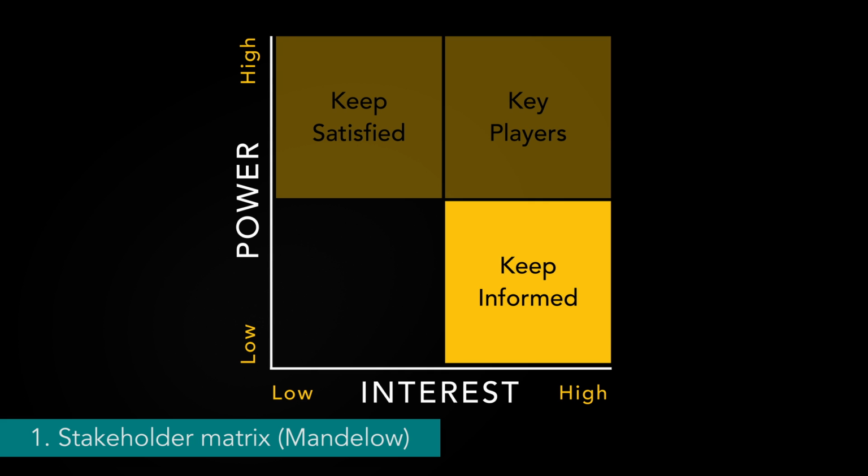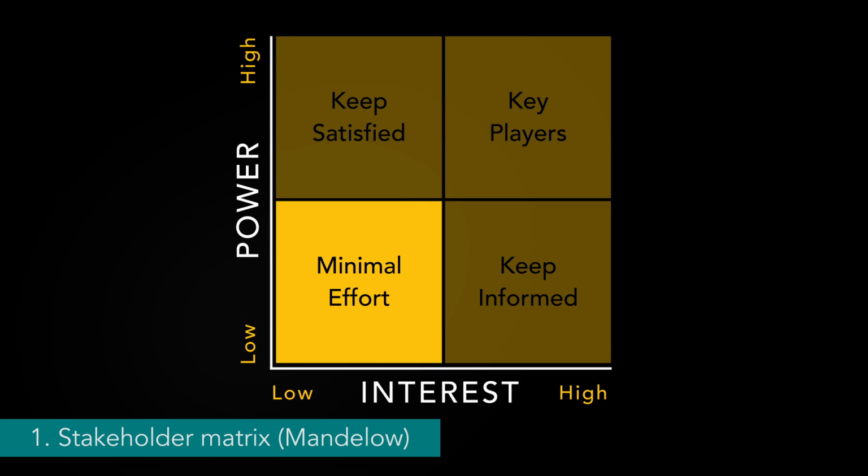Trust me, it's real. And number 4, lastly, you have your low-power, low-interest stakeholders. In practical terms, this is a group that gets the occasional update, report, or newsletter, and not terribly much more, except to say that there may be individuals in this group that you actually want or need to become more interested. So you can think about inviting those individuals to town halls or other types of meetings to try and get them more engaged. Obviously, this is still just a summary, but should be enough for you to start using this tool in a practical way.